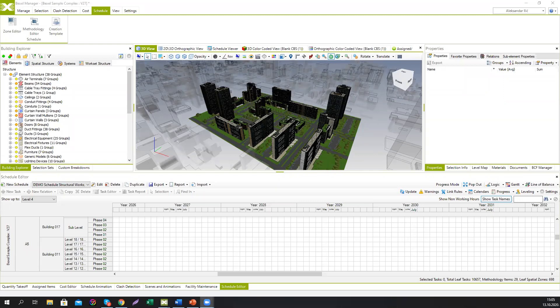When it comes to methodology, you have to use data from the cost editor — methodology items are related to the cost editor. Another question: 'Should I start with custom breakdown and then add extra data from the cost editor?' Yes, you can start from a custom breakdown, but what we haven't shown today is how to create the cost database — that was covered in previous sessions. The right workflow is to connect methodology with your cost database, and for spatial organization, rely on selection sets, custom breakdowns, or properties within the model itself.